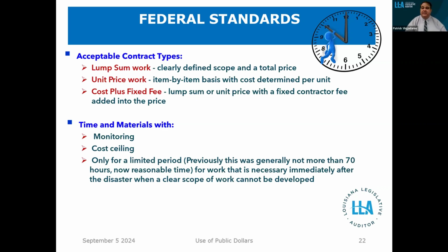The key thing is, in doing this, you need to make sure you're monitoring. For example, FEMA has called out public entities in the past for not monitoring. You need to know if you're paying by truckload for the debris that's being brought and hauled. You need someone who's actually monitoring to make sure you're paying for a full truck, not two-thirds or half, so that you're actually getting what you're paying for.